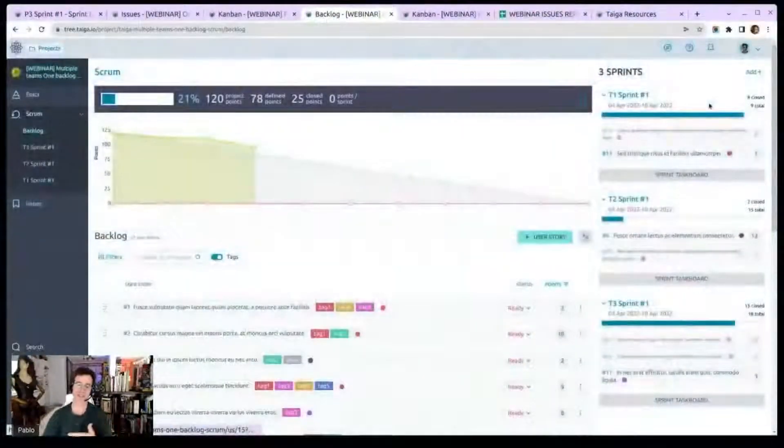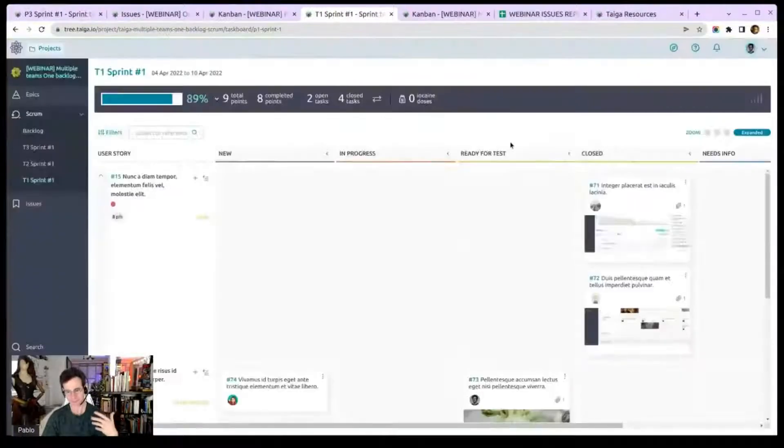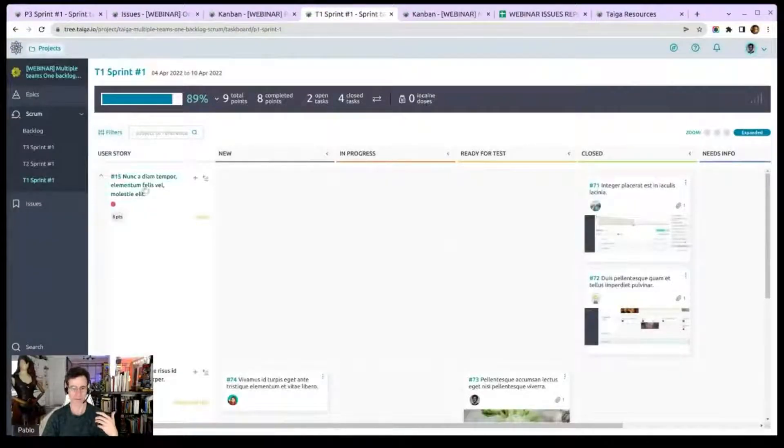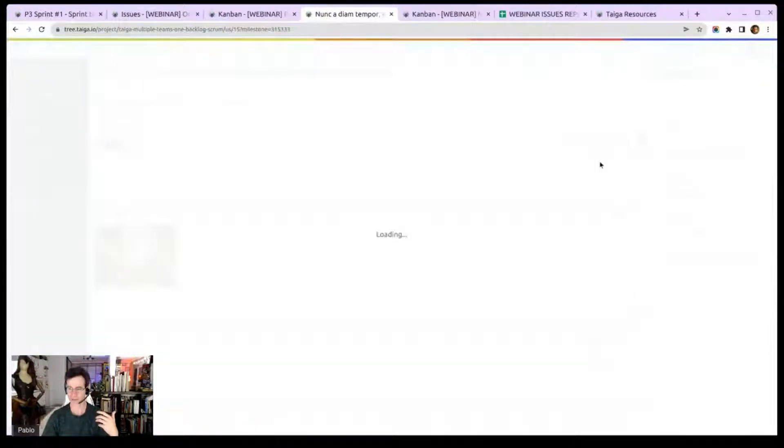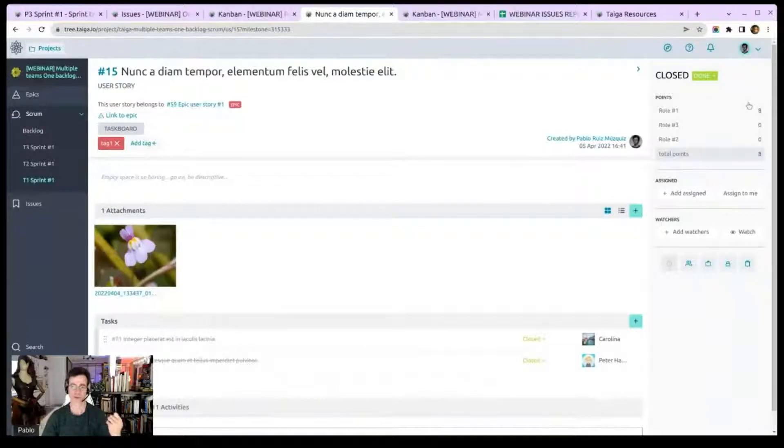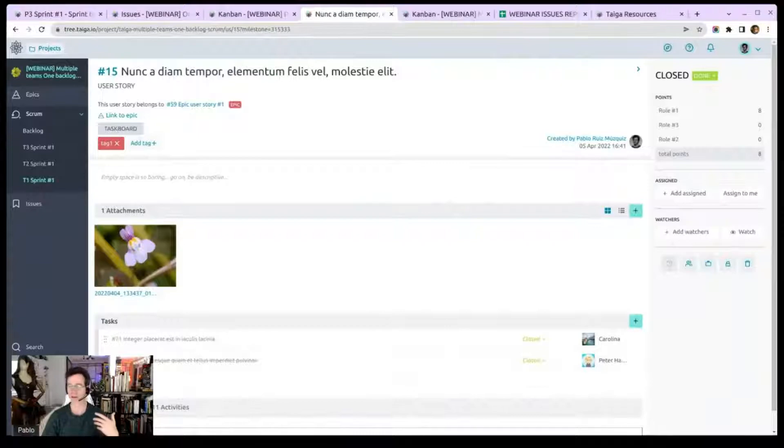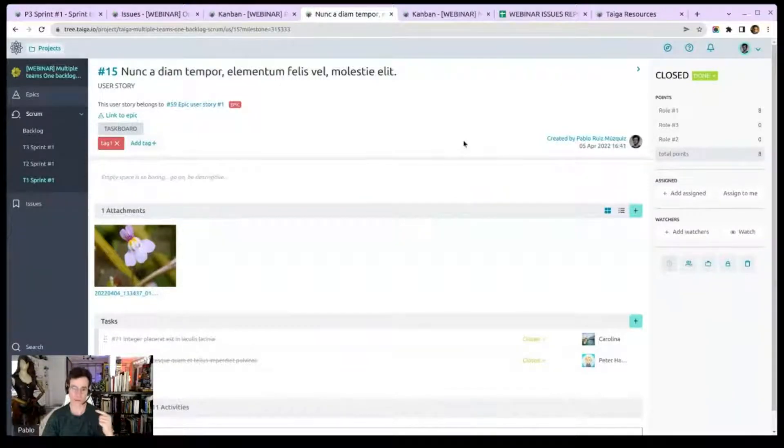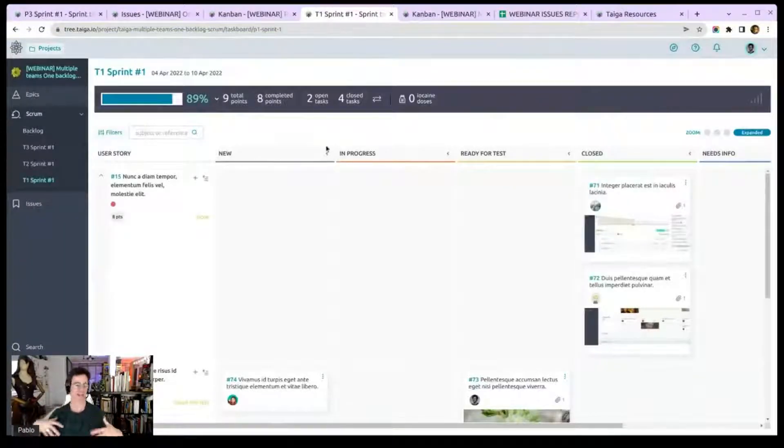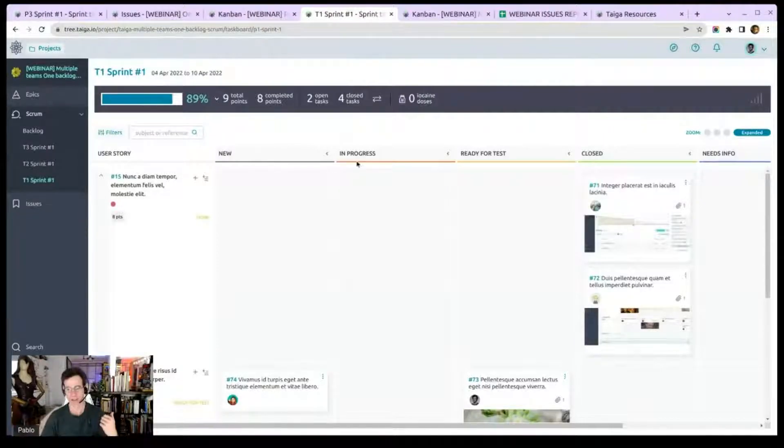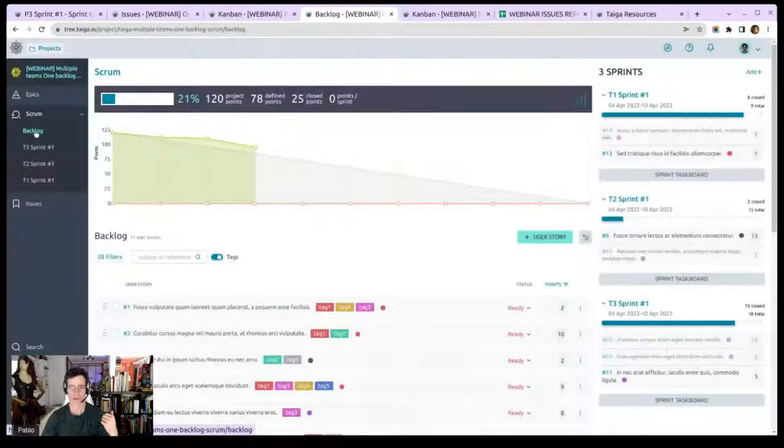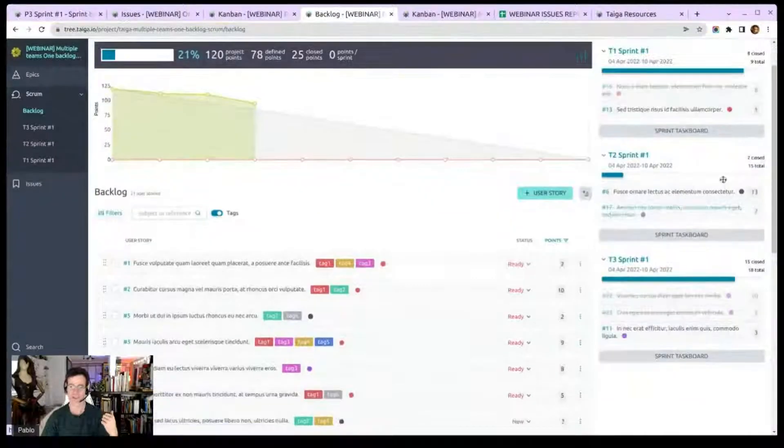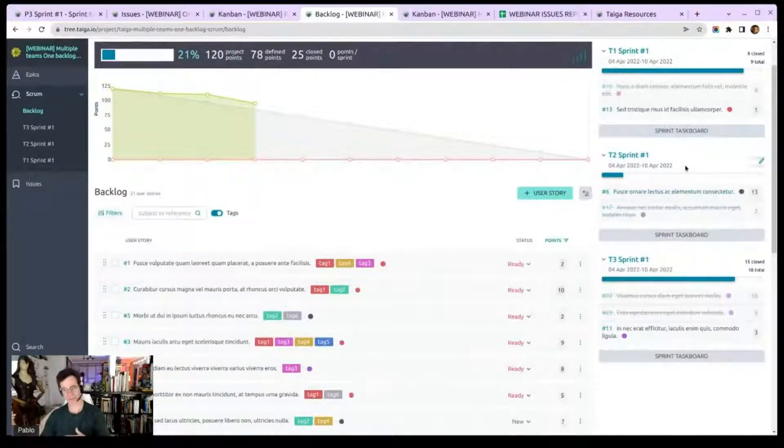Now, these sprints here, the team one sprint would work with, by the way, with estimates. I'll go just for this one. And you can have different estimates for a user story based on their role. So here you would only estimate the value or the time assigned for that user story for role number one, as long as that user story is in sprint number one. This will be like UX design research. And this becomes effectively the backlog for the second team whenever that happens.